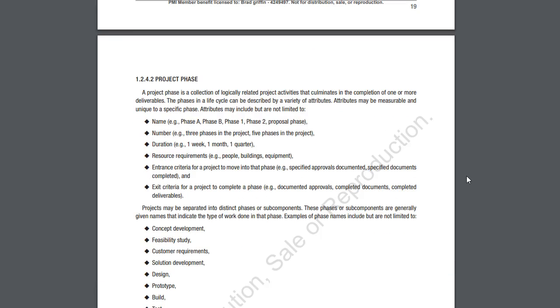And so those project phases, we may move them into additional pieces. Depending on that corporate structure, you may have things like creating committees. You may have a project committee that you have to go ask, is this something we want to proceed with? Some companies may have 10 or 12 projects that all get moved into a committee, and they have to pick 4, or the ones that will come to $1 million, or the ones they have resources for, or the ones they have a legal priority to do. Not all projects make it out of that initiation phase.